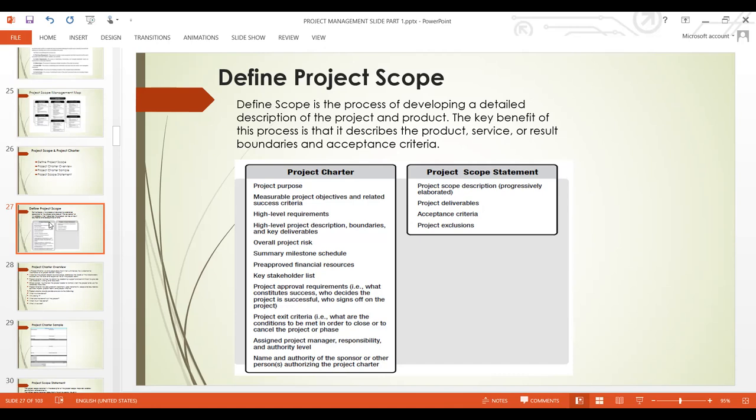There should be somebody who is responsible to decide whether a deliverable is successful or not. That's why in project management, every action you take, somebody must validate it. Any deliverable, any input, any document you are generating or producing, somebody must validate it. And validation is to review it to make sure that it meets the acceptance criteria, which is the standard for success.